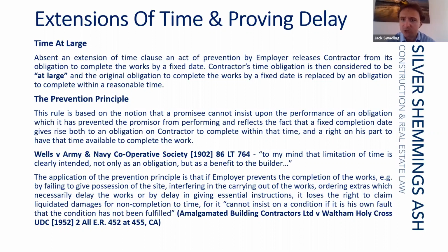But that's not a situation that the employer wants to find themselves in. So time at large is often an issue that is raised by a contractor claiming that the contract does not provide it with the entitlement to an extension of time due to an act of prevention by the employer, so setting time at large and putting it in a rather better position.